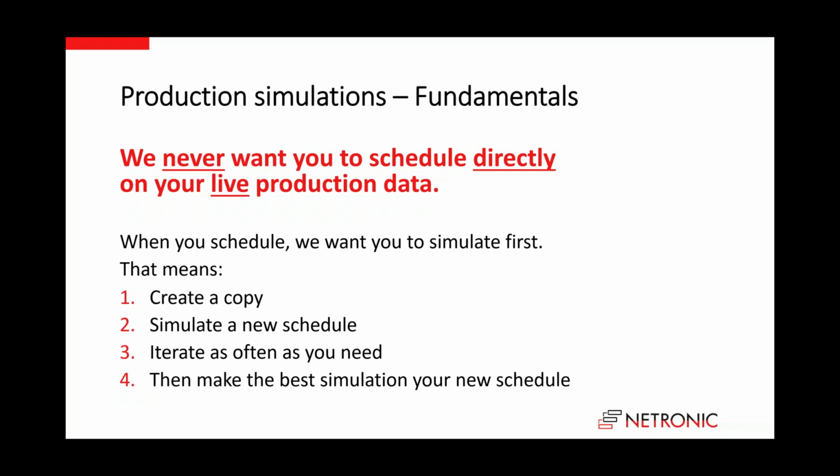So what we want your customers, or if you're a customer, what we want you to do is that you simulate first. That means literally we want you to create a copy of your production data. Then based on this copied data, simulate a new schedule. Then iterate as often as you need.